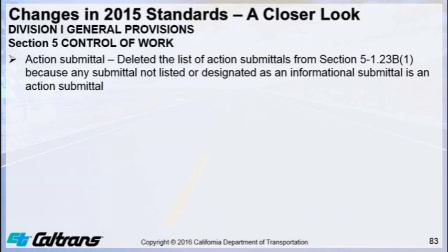The list shown in 2010 Section 5-1.23b1 for action submittals was removed from the specifications because any submittal not listed or designated as an informational submittal is an action submittal. So for action submittals, you have to get authorization before you proceed. I will repeat again, any submittal not specified as an informational submittal is an action submittal.